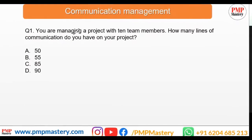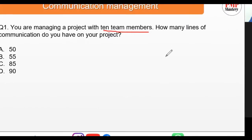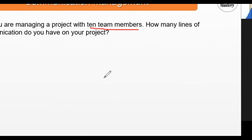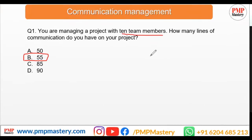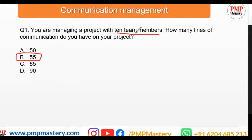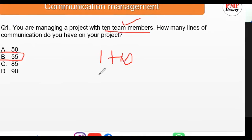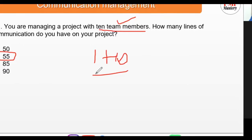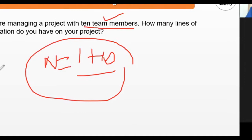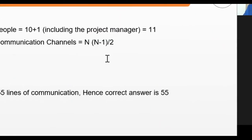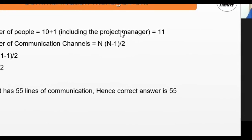Question one: you are managing a project with 10 team members — how many lines of communication do you have? The keyword here is 'team members,' so you include yourself as project manager, giving n equals 11. Applying the formula: 11 × 10 / 2 equals 55. The number of people is 10 plus 1 including the project manager, giving the correct answer of 55.